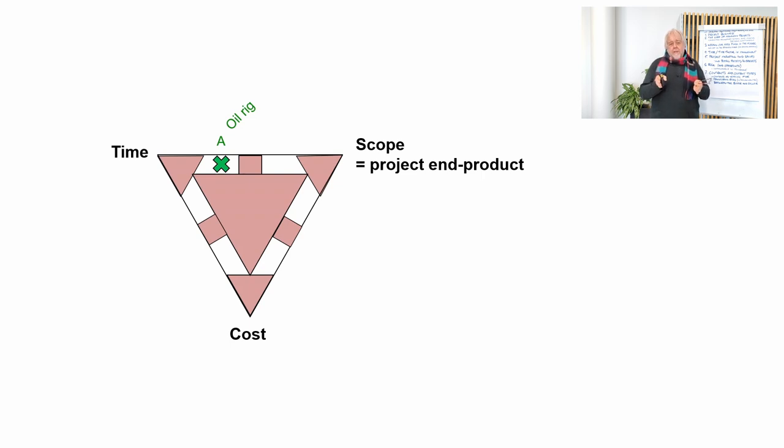And that means that when we are closer towards the end of this project, we cannot afford to wait for the next summer. So we must consider time as most important, to make it complete and take it out to the sea in this coming summer's July month.